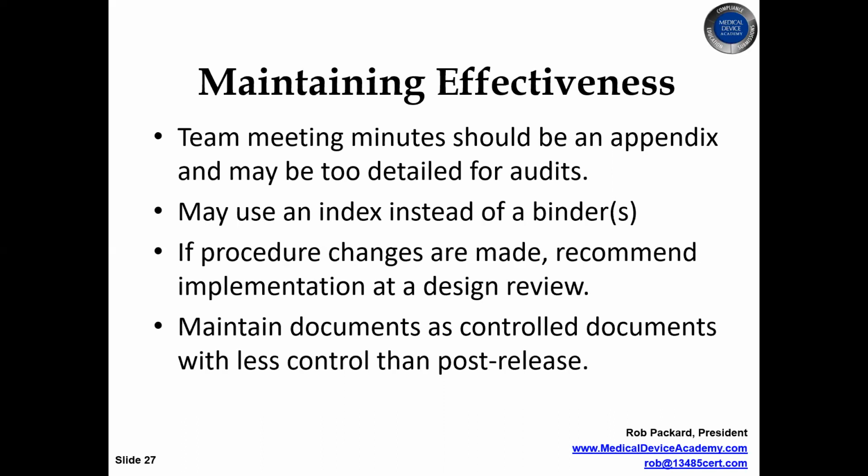But if you're just doing benchtop testing, the worst that's going to happen is you're going to have to repeat some testing and it's going to cost you some more money. So there is a difference, and let the risk of those changes and the implications of it determine how many signatures you want and who needs to sign off.